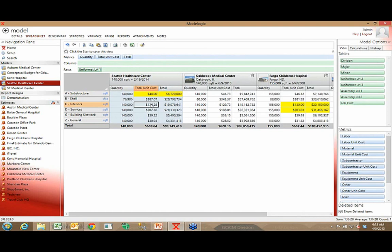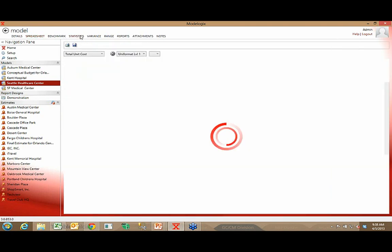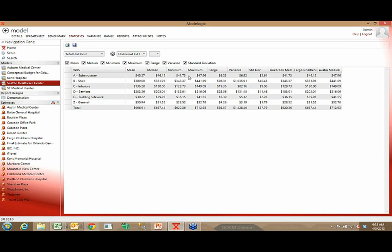Something else that I think is extremely powerful is in an instant, and you can begin to kind of see here how long would it take me to gather this information if I had to do it manually. Like right now, we're looking at the average unit prices in this model. If I click on the statistics drop-down, you see total unit cost. In a second, I see what was the mean unit price across these projects in the model. What was the median unit price? Minimum, maximum, range, variance. Minimum and maximum is extremely powerful. I can in a second see what's the least expensive we've ever performed this work. What's the most expensive we've ever performed it? And what's the gap? Because anywhere where there's very insignificant gap, I'm pretty confident that those unit prices are going to be pretty solid going forward. And I know that because historically it's been true. Anywhere there's a big gap, I know that's where my risk is. And if somebody said, how do you know that's where your risk is? Because historically, that's where the variance has been. So I have that information quickly.